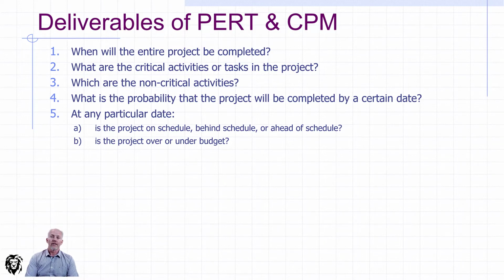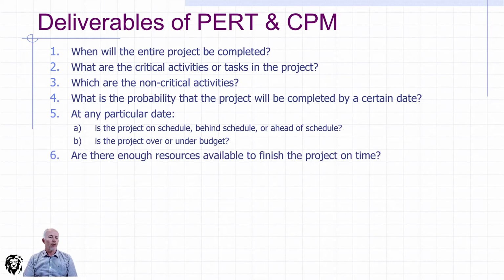Now, with all of this established, of course, what we have is an absolutely great baseline on which we can track our progress and report variance. So we can know if we're ahead of schedule or behind schedule, and because we're overlaying costs into this, we can know if we're on budget or behind budget, or whether our resources are falling short, or whether we have sufficient resources to get to the end of the project.